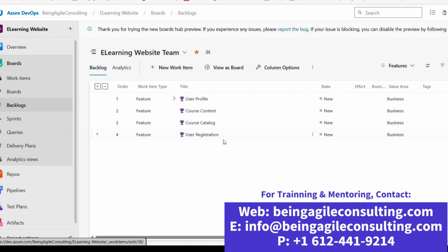Now that you all know how to set the dates, let me also say this: these dates that I'm putting in there are not just some fiction. It's recommended that these dates should come from an empirical place, which means that the team should be the one giving the estimated date based on their history, based on the work they've done before, based on their estimates. They will be the one to give this information, not some leadership sitting somewhere and putting this information on their own without knowing the reality of the team.